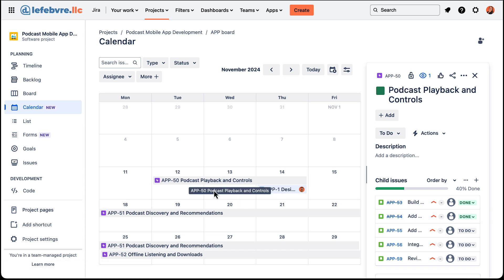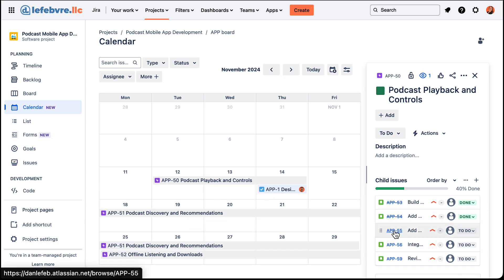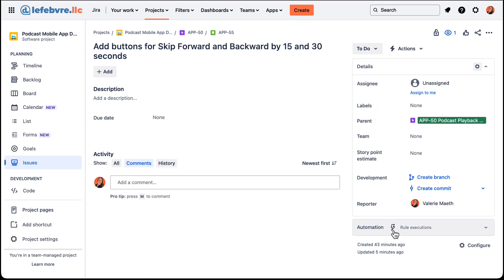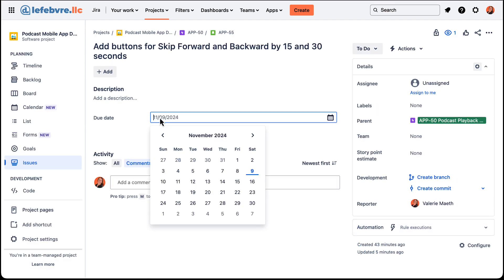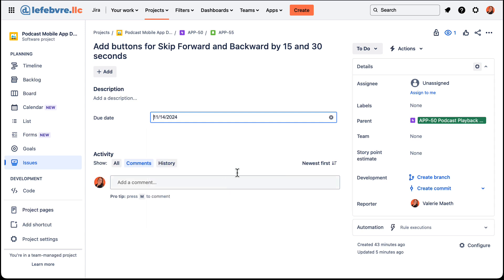So if we were to open up this epic we can see there are a lot of other stories underneath the epic that we created that are not showing up on the calendar. If we want them to show up on the calendar we have to associate a date with them — so let's open up one of these and we have the due date field here, let's add a due date.